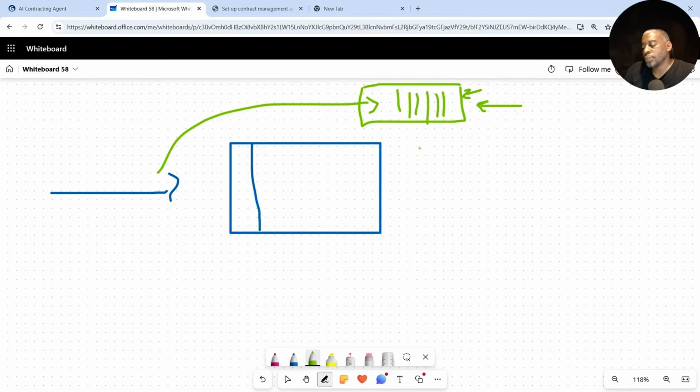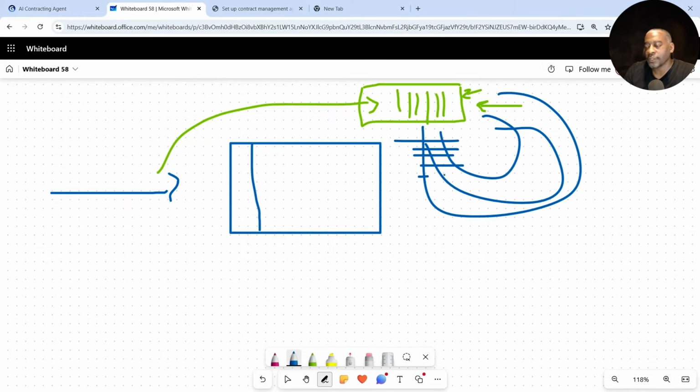That ranking is critical, because what you want to avoid is the scenario where everything reported must get done. You would never get to prod. It would just slow you down from getting to prod. That's why that ranking is critical, to make sure that our MVP is addressed and we're putting something in the hands of the users sooner rather than later.